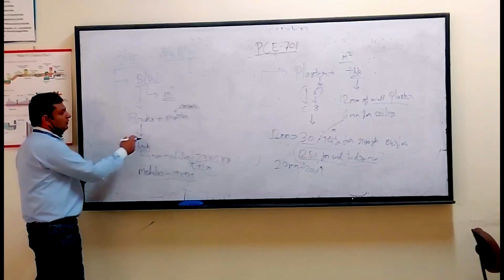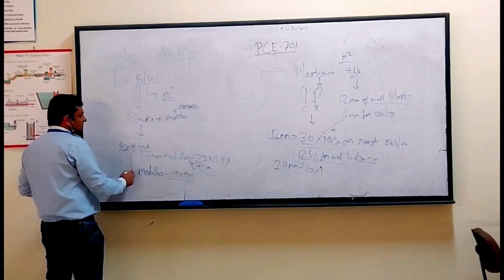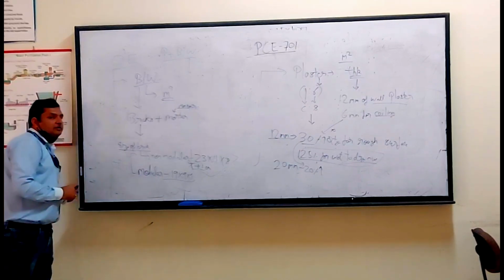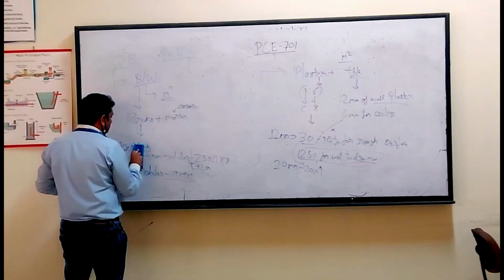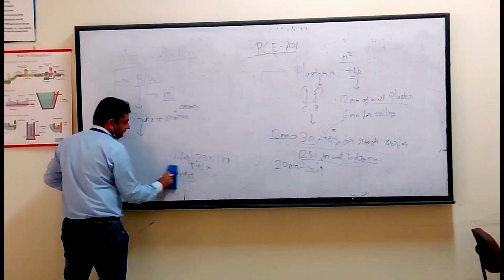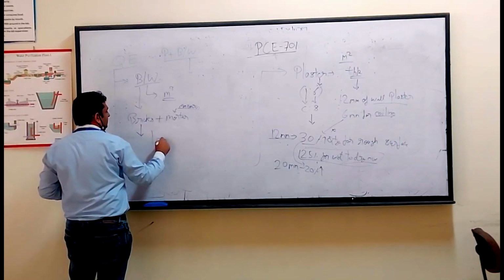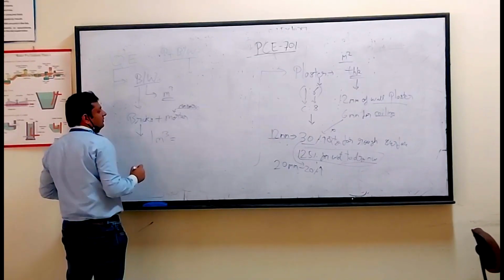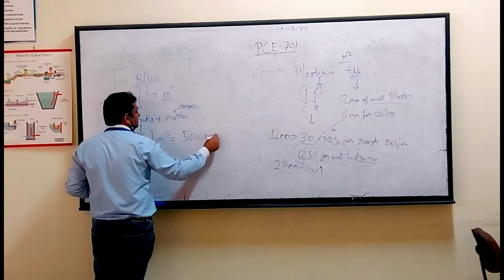But when we calculate the volume of each brick individually, it comes out that these two, despite having different dimensions, have approximately the same volume. So we take this as our assumption: for 1 cubic meter of brickwork, the number of bricks required, including wastage, is 500 units.